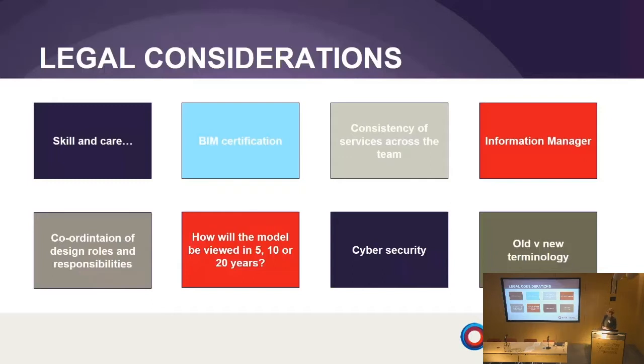Further consideration I would look at is consistency of services across the team. So, and this kind of sits with overlapping of design responsibilities and coordination of roles. So looking at consultants' appointments on BIM projects, we're seeing some things are repeated and some things are missed because there's new things involved and no one's really sure whose responsibility it is. It's not the lawyer's role to look at the services as it's technically a technical document, but I advise you guys to have a look really carefully and make sure it is spelling out exactly what it is you are doing or what you think you're doing.